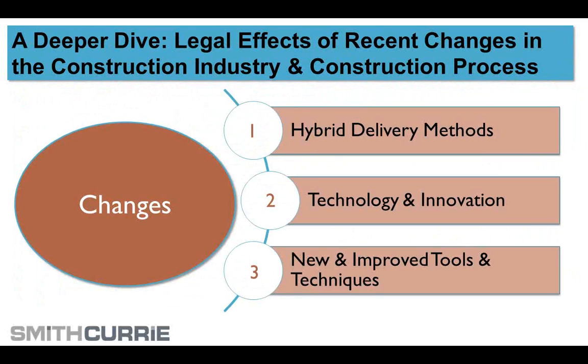Masonry contractor may be a term where we think we know what a masonry subcontractor or an electrical subcontractor or a mechanical subcontractor does. But I would suggest to you that until you look at the contracts, you don't really know what all that entails, because it's like a game of chess where the pieces are moving around the board, and you could be called an electrical subcontractor. You could have an insurance program that has served you well for generations as an electrical subcontractor. And lo and behold, on this project, you also have some design responsibility.